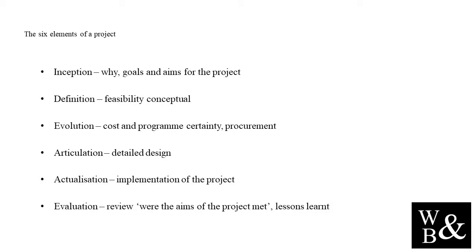In this element, you want to eliminate assumptions and therefore gathering of existing information is key. If planning permission is needed for the project, in this element, you and the project team will initiate outline planning permissions with the local authorities.